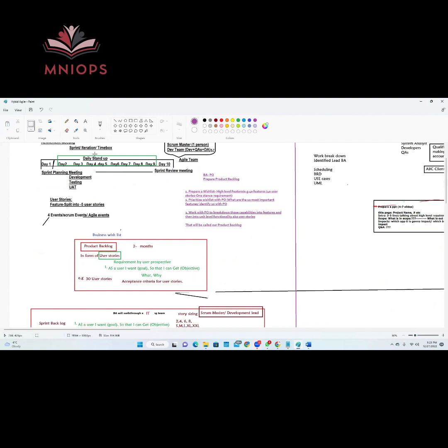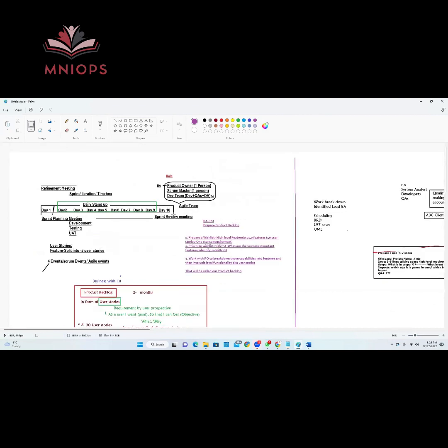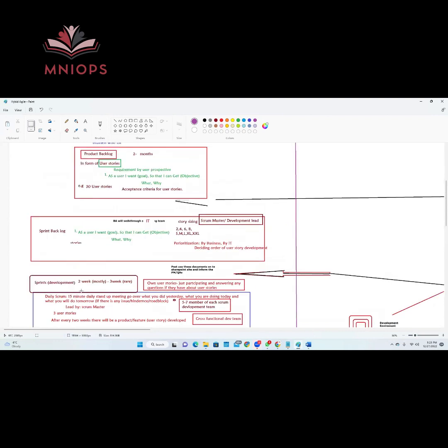This is what we have done. They show them working software. Based on that demo, the product owner accepts the user story. And on day 10, the whole team gives an end-to-end review of the feature they have built, and we call it the sprint review meeting.